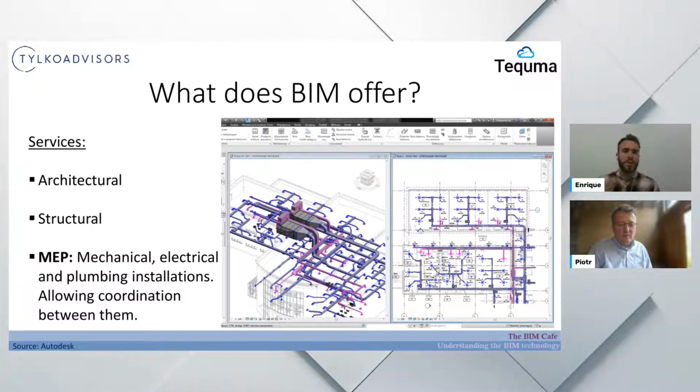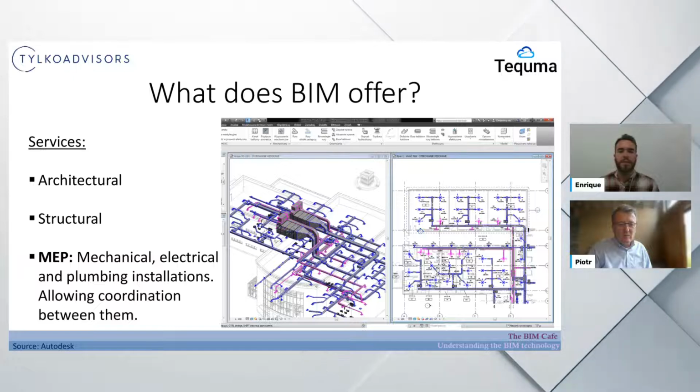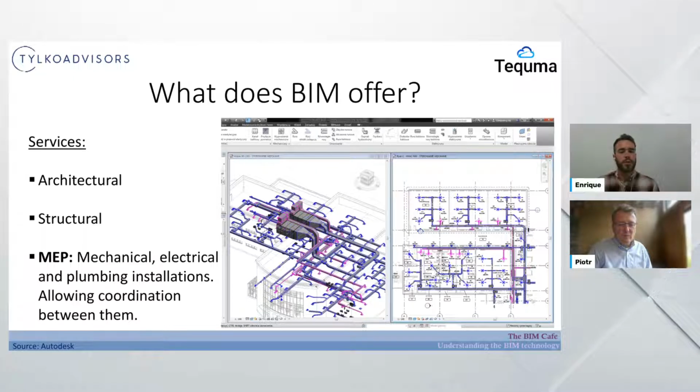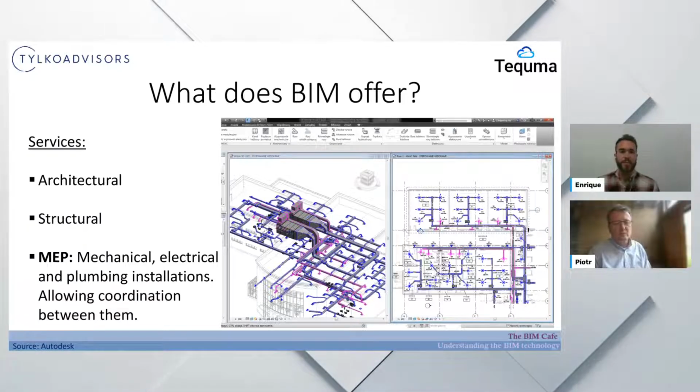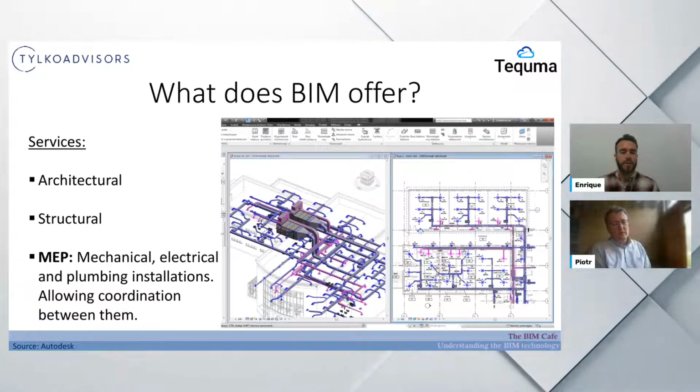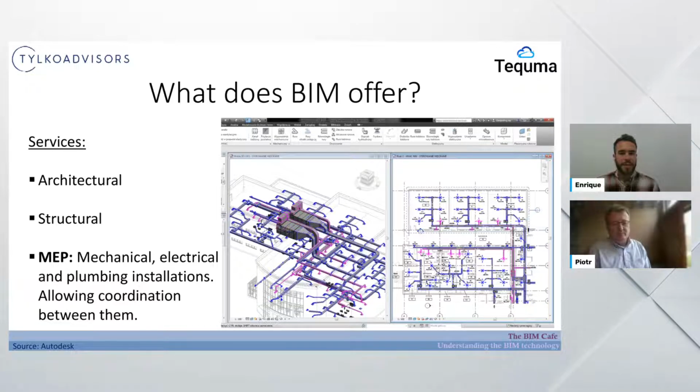No, I want to go through this hole or up to this ceiling, and they don't think about the rest of them. So they plan their own system, and they overlap it with other services, with other providers, and see if there are clashes, if there are overlays. You can run your system without clashing with other ones. So it's a very important characteristic for these suppliers.